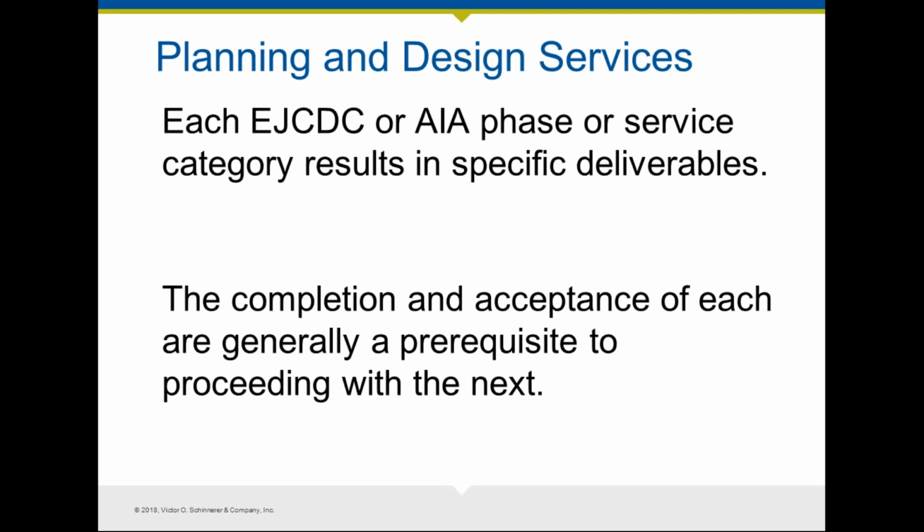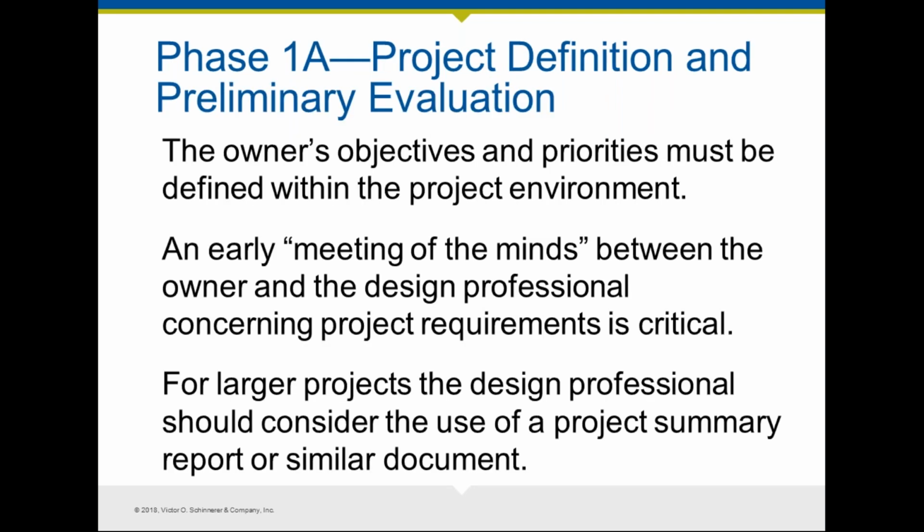And so you move, for example, from schematic to design development without having actually had the owner sign off on that. That can be fairly wasteful. If the owner decides to come back and change something, what you're relying on is the owner's approval of the completion of the prior phase to be able to plan your resources accordingly. Because if you're going back and forth, that could mean that your project is no longer profitable for you.